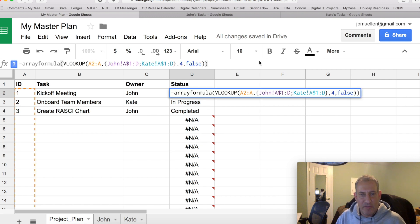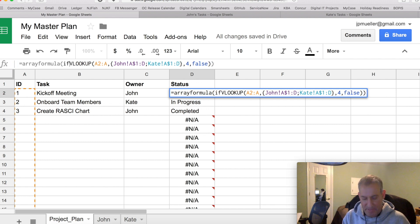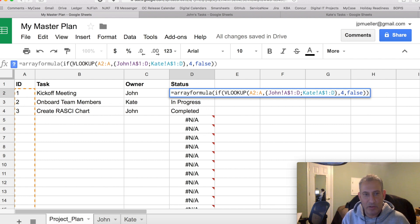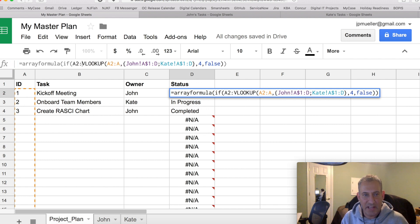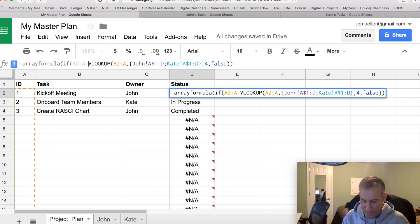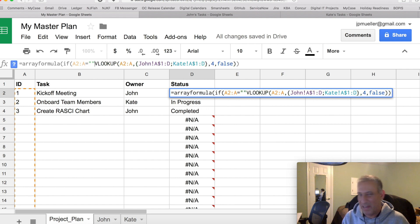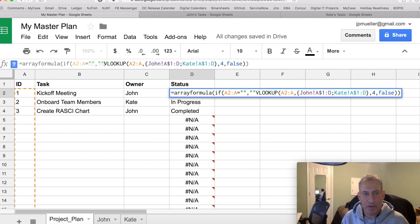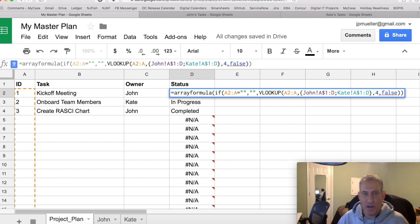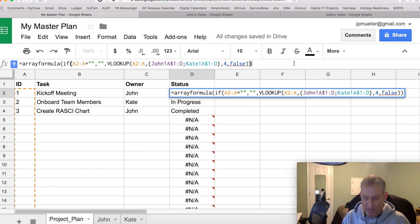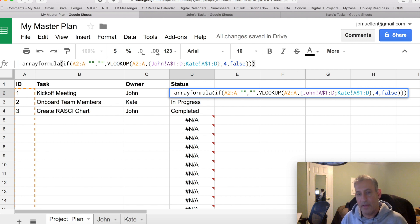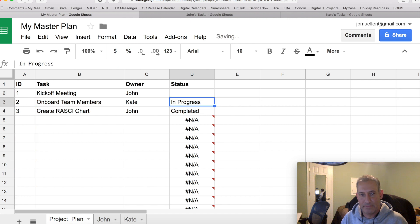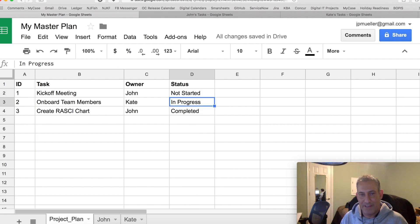Before I do the VLOOKUP, I'm going to put an IF statement. And I'm going to look first if anything in column A equals blank. Meaning I have no task ID. If so, I'm going to return back nothing. Otherwise, I'll return back the value I find in the other sheet. Let's let that refresh. And there you go.